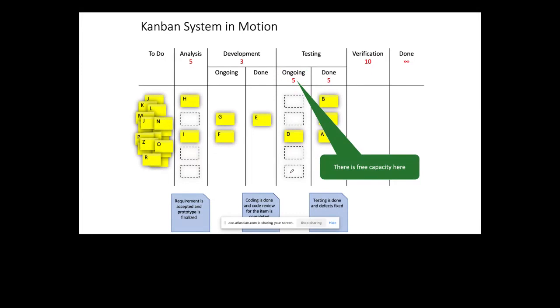The second thing that needs to be checked is our policies. We have an item in the development done state. Is this particular ticket satisfying the done criteria, right? Basically, the testers will check whether they have free capacity, whether the developers have done something, and whether, even though the developers have done it, they have actually done it properly. Have these policy criteria been met?